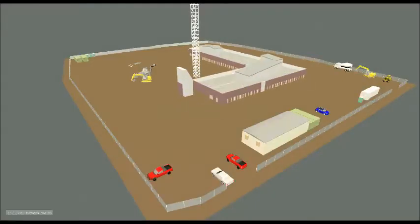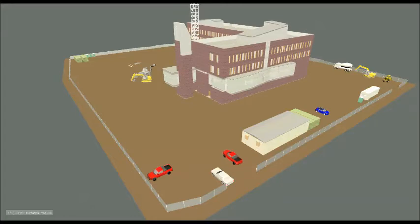We will review site access as it relates to the building. When the project team enters the site, they will go around the trailer and park on the other side of the connex. Visitors can park on the immediate space to the left of the entrance.